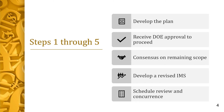Step 5 is the schedule review and concurrence. This is where the contractor and DOE project teams assess the logical sequencing of the schedule, validate the activities and durations, and verify horizontal and vertical schedule integration and traceability. Upon approval of the IMS, the contractor proceeds to Step 6.